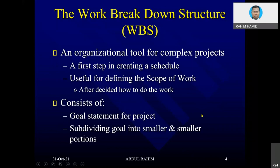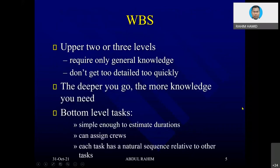We divide into smaller and smaller portions — sub and sub and sub — that is what the breakdown means. When you want to split, how many levels do you want? There is no clear regulatory requirement to what extent you want to split. But as I mentioned, if you go into more detail, at the end of the day you will make your life difficult because when you want to update the schedule you need all the information.